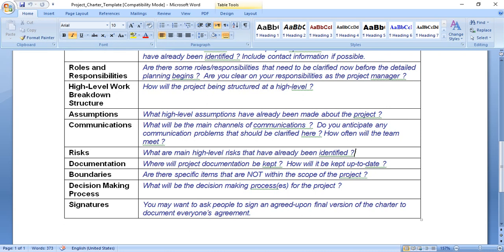Number two, supplemental staffing, time and material. The organization can hire additional staffing from a vendor, like a manpower supplier company, on a time and material basis, whereby the vendor is paid for each hour the contractor works. This arrangement is often used for ongoing support or when the effort needed to complete a project is difficult to measure.